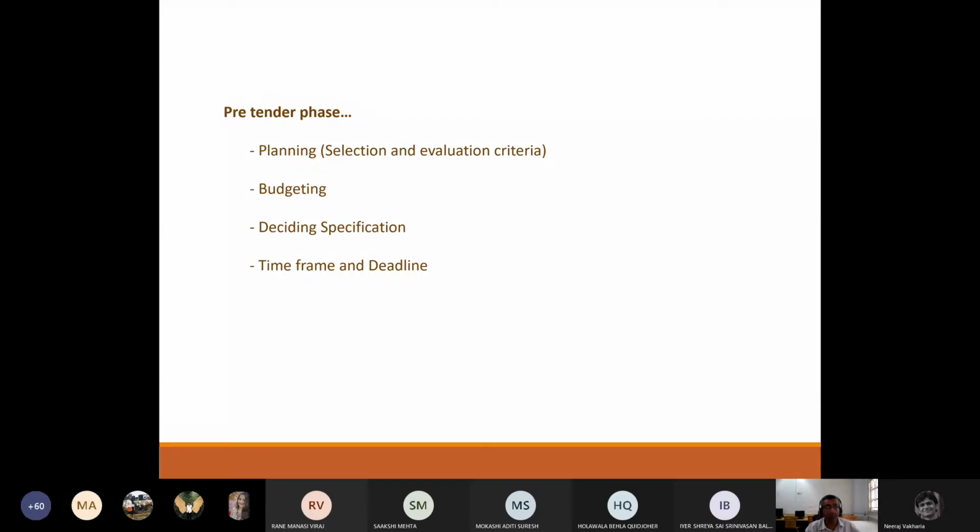Point number two is that in case the figure you receive from the contractor goes haywire, then you know exactly where he has gone wrong. You can do a comparison. If you compare his concrete works and your concrete works, and you see that his concrete rates are higher, that is why the entire project cost is going haywire.